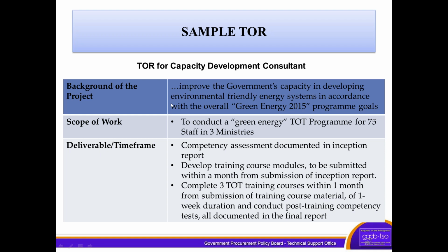And then complete 3 TOT training courses within 1 month from submission of training course material of 1 week duration, and conduct post-training competency tests, all documented in the final report. So here it is SMART: specific, measurable, attainable, realistic, and time-bounded.